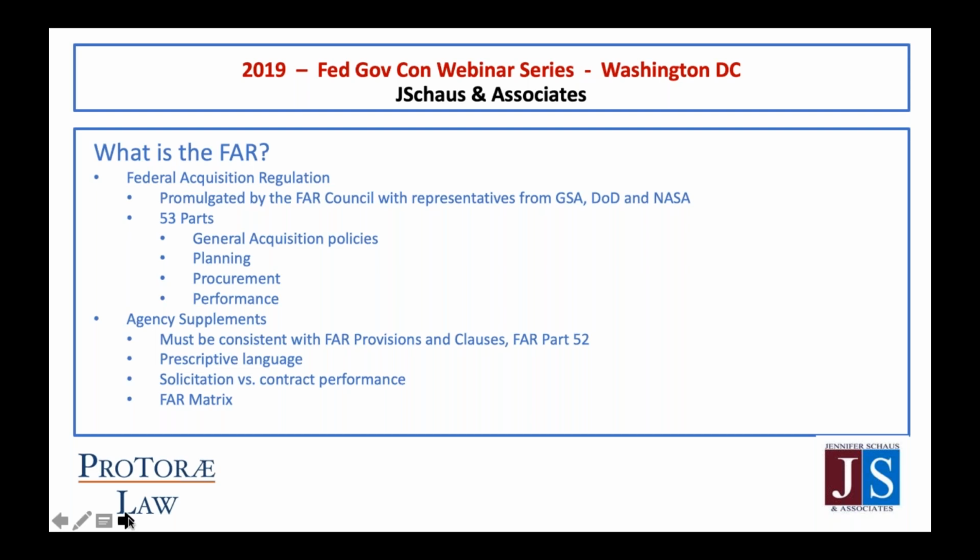FAR clauses in the FAR contain prescriptive language requiring other FAR clauses to be included in a contract, a prime contract. And those clauses are really divided into two: solicitation provisions, and clauses that apply to contract performance. So there really are two types of quote-unquote clauses or quote-unquote provisions in a contract or a solicitation. The solicitation provisions will drop out. The clauses addressing performance will stay in.